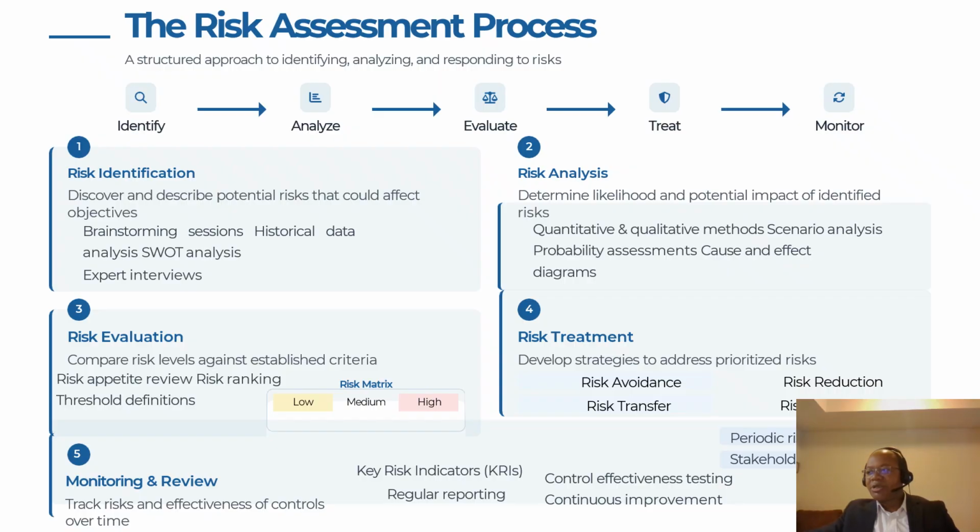So, in treating risk, there are usually four major approaches. One is to say, well, let's avoid this, let's not take part in this. Then you can transfer your risk. Insurance is a huge tool in risk transfer. You can also reduce the risk. You can accept some of the risk. There are certain things you can say, okay, well, because the severity is low, we accept this. If it happens, there's a contingency plan in place to do that.